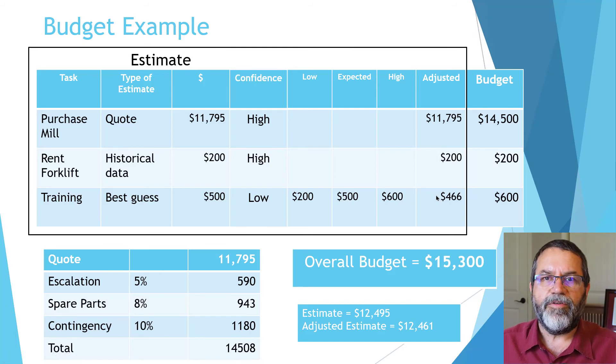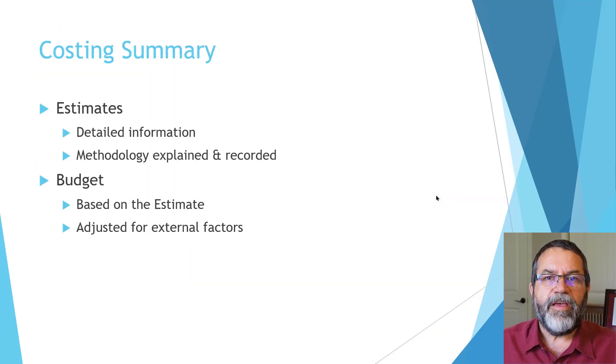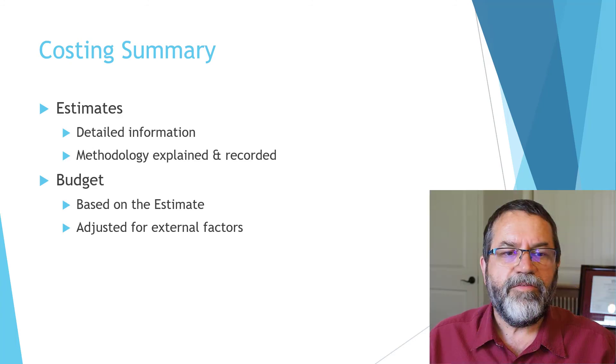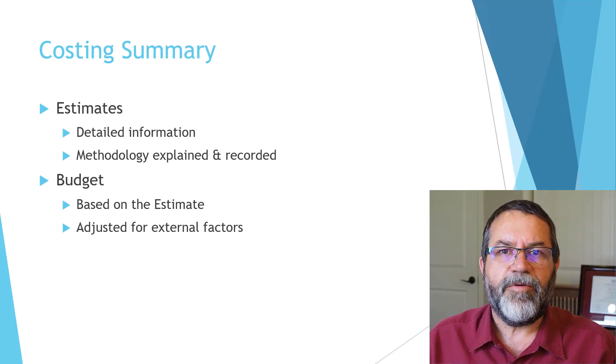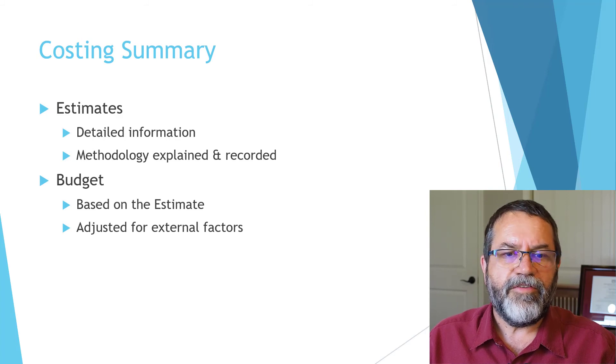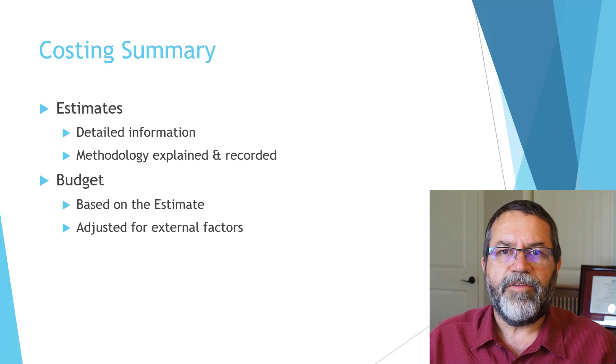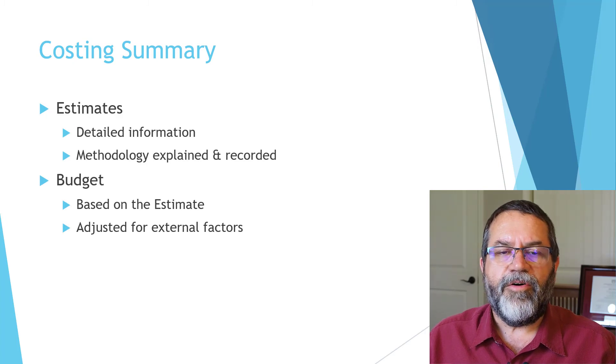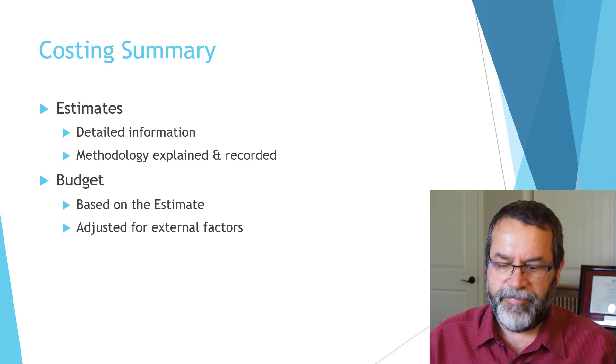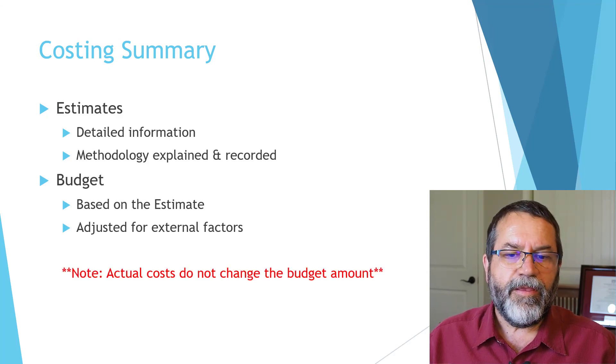In summary, the estimate is detailed information on how much the project is expected to cost for each item. The methodology is recorded and explained—you know what your level of confidence was in each number. The budget, on the other hand, is based on the estimate but also adjusted for external factors.